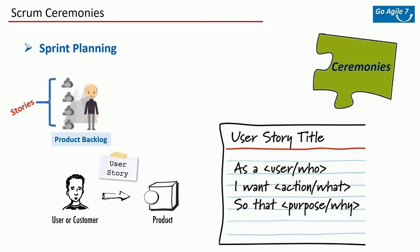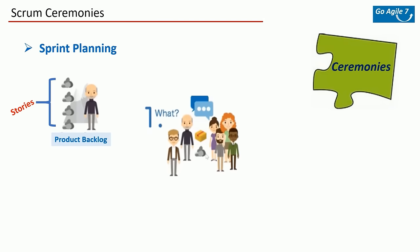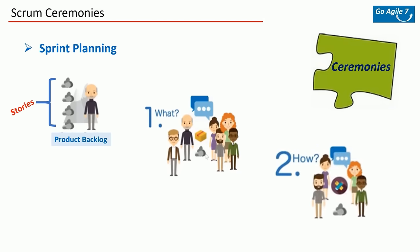Generally a simple template is followed for user stories — explaining how the business visualizes the functionality. That's why they're called user stories. Product Owners should be well versed in writing user stories in a way the business visualizes them and the team can easily follow. There are four key elements of a Sprint Planning ceremony: define the scope of the sprint — determine which tasks in the product backlog your team intends to tackle and assess your team's current work capacity, factoring in holidays and days off.